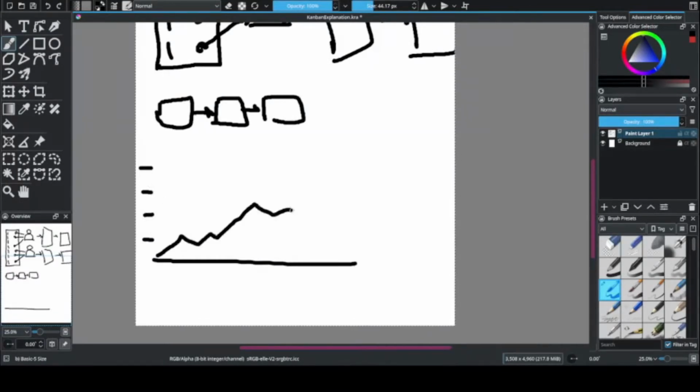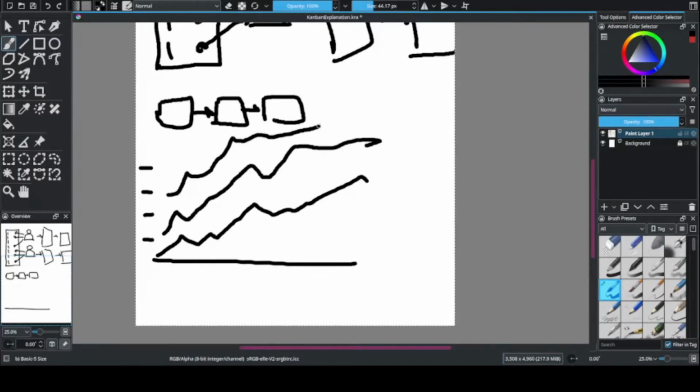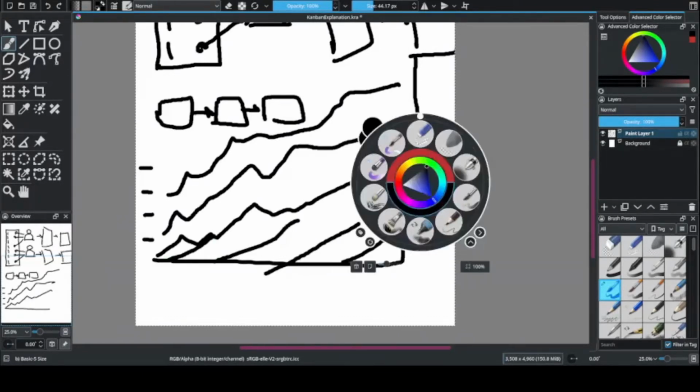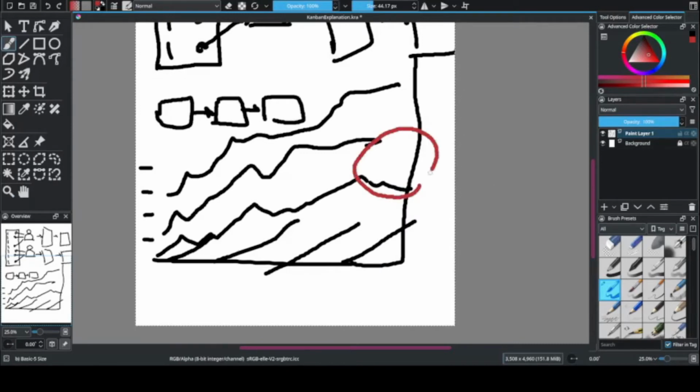What's interesting is between these three lists, as tasks move between them, you can actually graph how many are in each category in kind of a stacked chart. And you can use this chart to figure out where certain dead zones are. So like right here, the bottom one is always going to be the to do, and then doing, and then done.